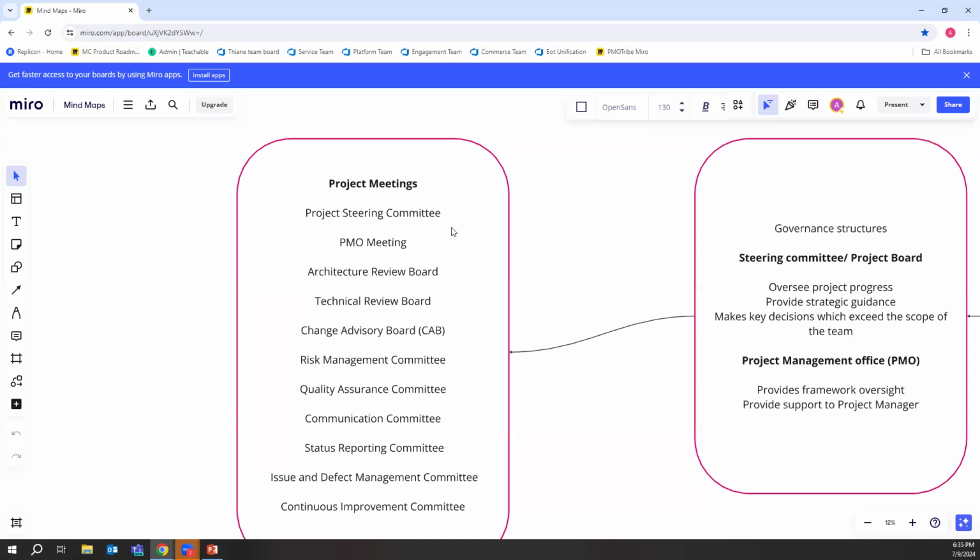So how do you manage those political interactions that can happen in your steering committee? It can be, and it is in most organizations, a very, very politically charged environment, right? One tip I can give you is make sure that there are no surprises, whatever you do. The more you increase the frequency, that helps, but always make sure that whatever pack you prepared for the executive committee goes out with enough time so that everyone understands what's in there. Or better yet, have conversations with them before.